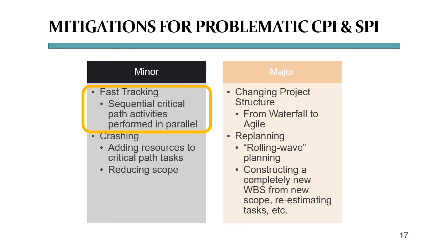Naturally, you can only select critical path tasks for this. Otherwise, selecting non-critical path activities will not have any effect on your project schedule.